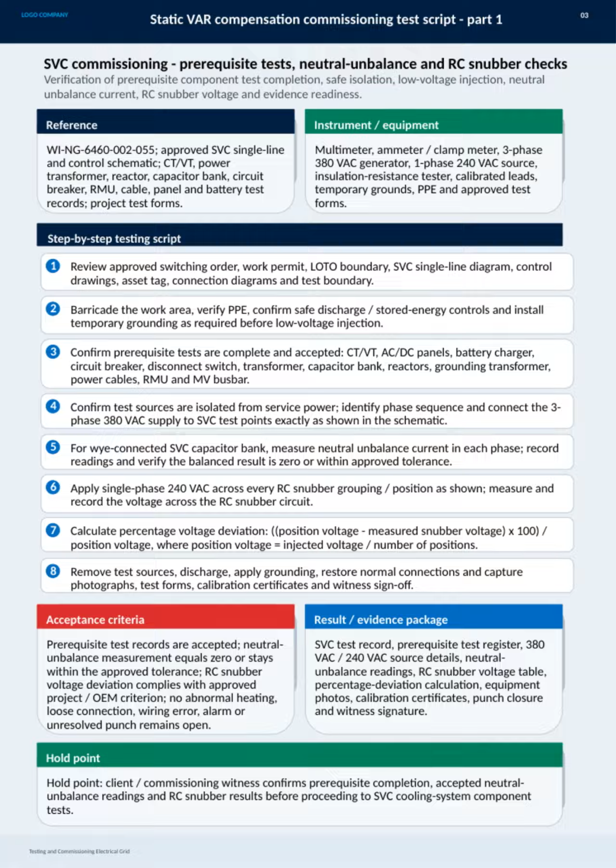This leads us to the hold point where the client or commissioning witness must confirm the completion and acceptance of all prerequisite tests and measurements before we proceed to further system component tests. This meticulous process ensures both safety and reliability throughout the commissioning.